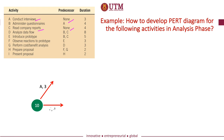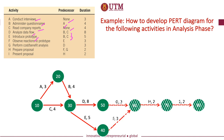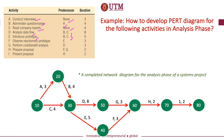Nodes 20 and 30 are drawn at the end of these respective arrows. The next step is to look for any activity requiring only A as predecessor — activity B is the only one. So it is represented by an arrow drawn from node 20 to 30, labeled B,4. Because activities D (analyze data flow) and E (introduce prototype) require both B and C to be finished, arrows labeled D and E are drawn from node 30. Nodes 40 and 50 are events that recognize the completion of both B and C. This process is continued until the entire PERT diagram is completed, with the entire project ending at event node 80.